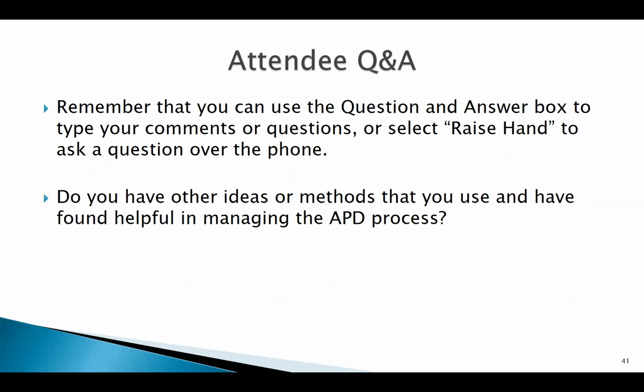So the first question that I want to ask is, do you only do an as-needed APD for an implementation APD, or would you also possibly do an as-needed APD for an operational APD? And I think Nicole is going to answer that question, please. Thanks, Nick. Yeah, I thought I answered it in the chat as well, but that applies to both an OAPD or an IAPD. It's anytime there's a change in the system's scope, concept, cost, schedule, cost allocation methodology, or project acquisitions.